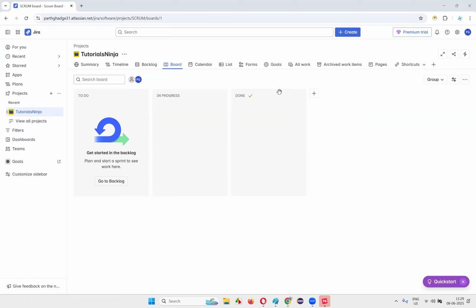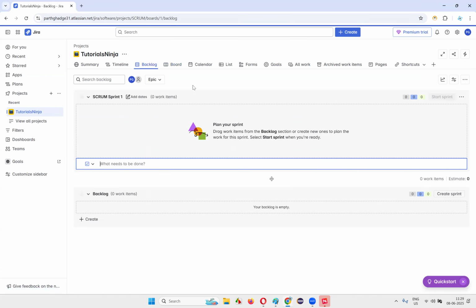Once assigned, the product owner will gather the requirements and put them into a backlog known as the product backlog, and can prioritize them and estimate them. Before the software testers and developers work on this project in sprints, it all starts with the product owner first.